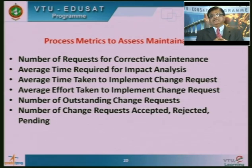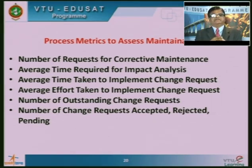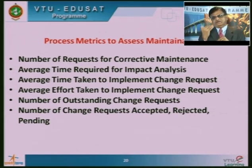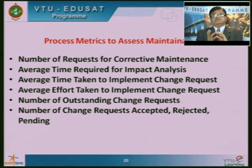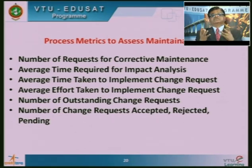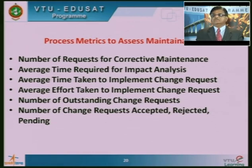When undertaking maintenance, we must maintain a lot of metrics and measurements to track progress: how many maintenance requests are coming for corrective maintenance, how many are accepted, rejected, or pending, how much time is required for impact analysis, how much average effort is taken to implement change requests, and the number of outstanding change requests. All such information gives us visibility and helps us improve our maintenance response.